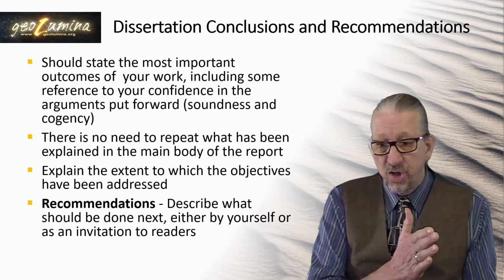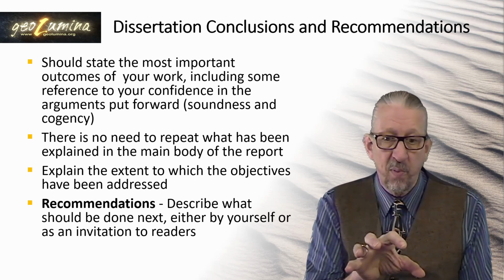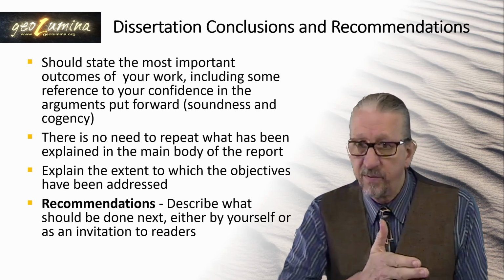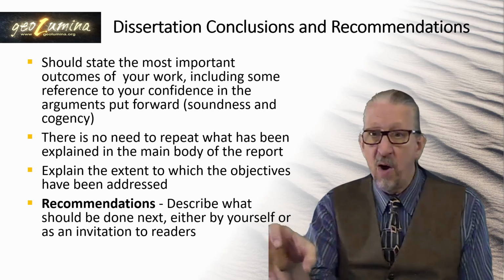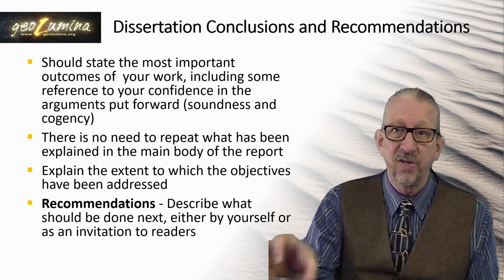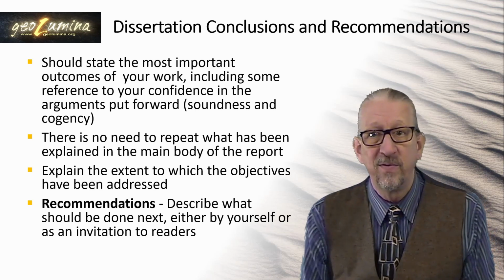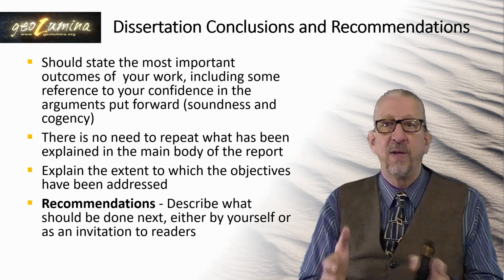We're making decisions throughout the study about what we can and can't do, and whenever I reach a point where I decide something cannot be done for reasons of lack of time, resources, data, or whatever, I immediately park that in the recommendations section so that when I eventually get to finish that off, it's already sat there waiting for me. So this whole report is not something which is done at the end.